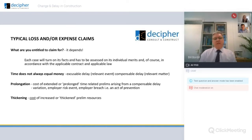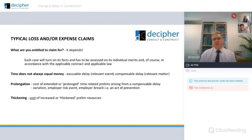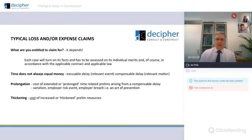Remember also that time does not always equal money. There are two types of delay: an excusable delay covered by a relevant event in JCT, and a compensable delay covered by relevant matters. Just because you have an excusable delay doesn't mean you have a compensable delay. For example, extremely bad weather would be a relevant event — excusable delay — but not a relevant matter, so not compensable. You'd be entitled to an extension of time but not extra money. However, if it was a variation or employer risk event, you'd be entitled to extra time as a relevant event and extra money as a compensable delay.